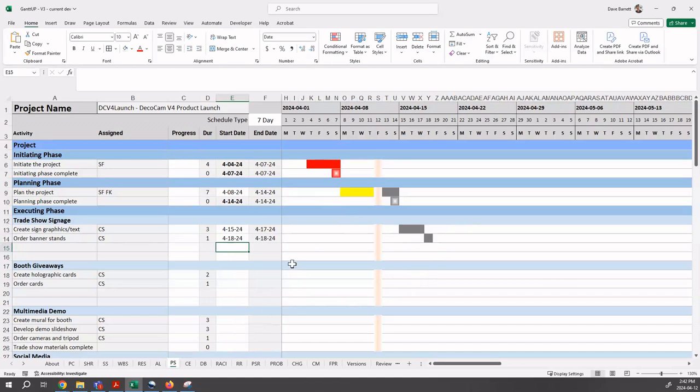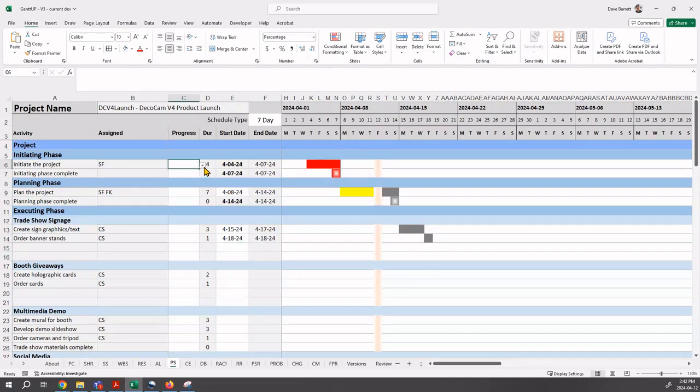Now let's pause here to talk about the color scheme that's happening here. You can see that we've got red, yellow, and gray. Red means that this activity should have been done. It should have been complete on April 7th, but it's not done. And the reason why it's not done is because of this progress field. This is where the amount complete of either zero, 25, 50, 75, or a hundred percent. Blank is the same as zero.